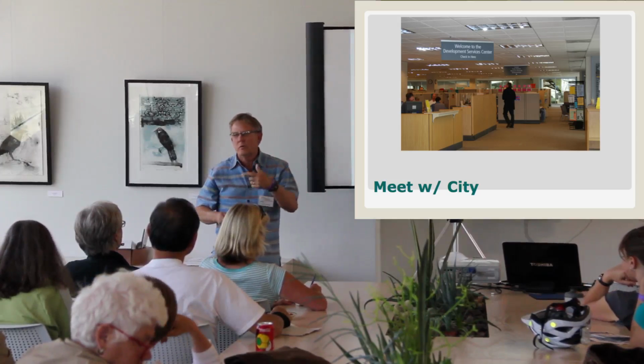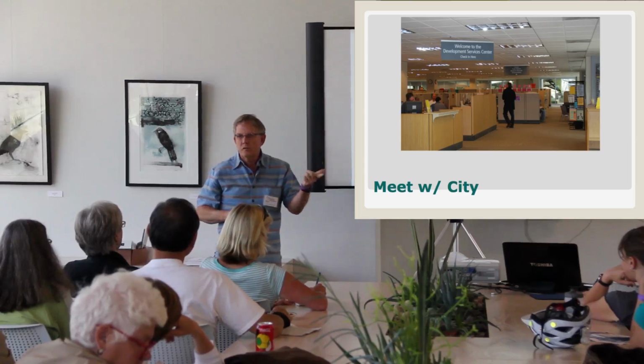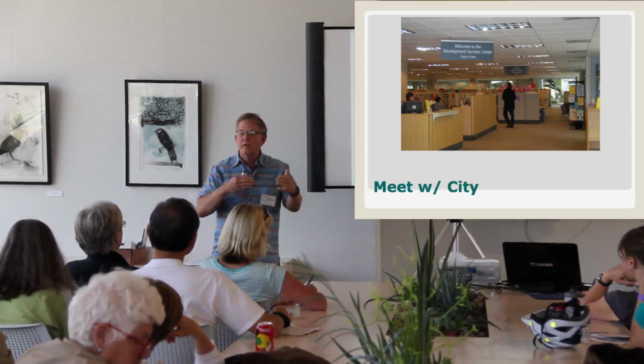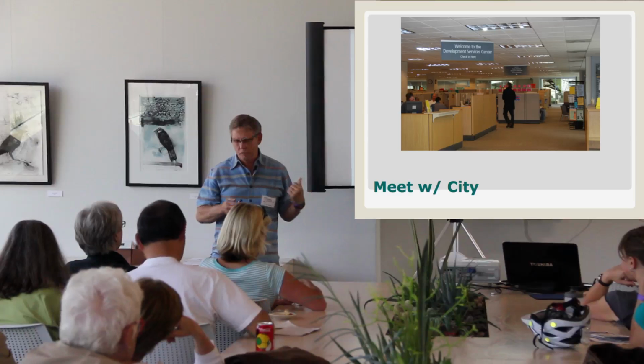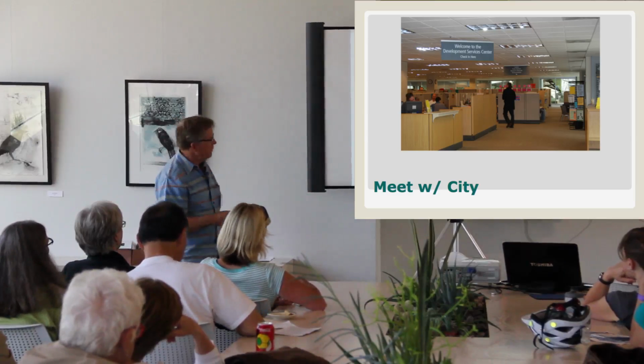I also meet with the water department, that's a big cost factor. Transportation, if there's a driveway involved, and try to head off any issues that might come later down the road when we actually apply for a building permit. Very important to get that done before we get too far down the road.